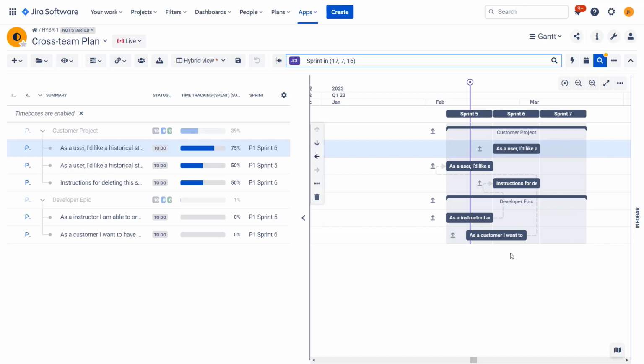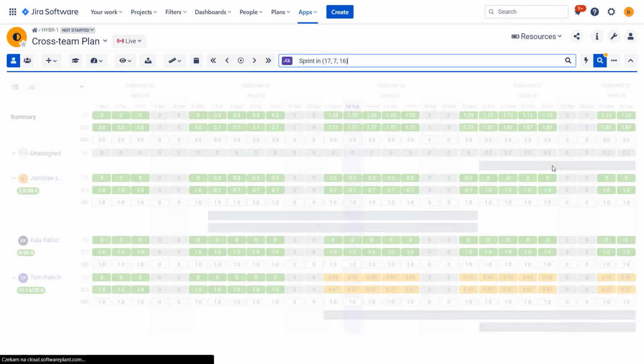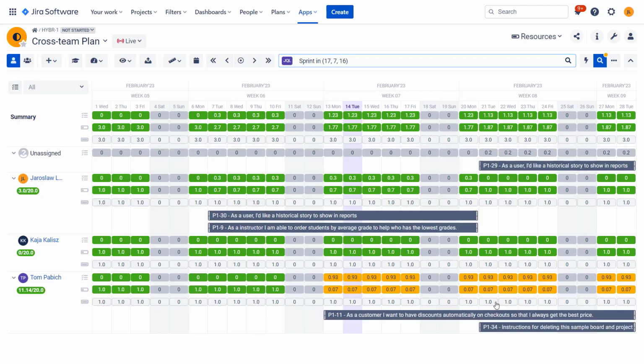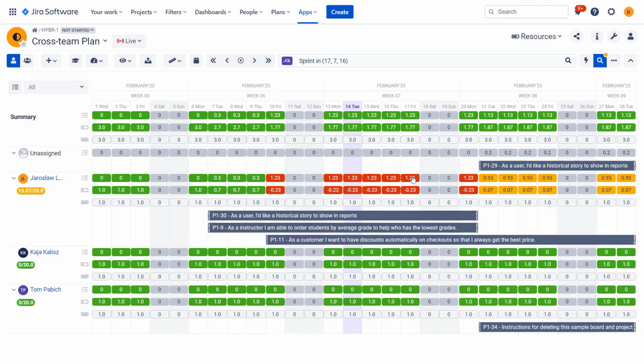But for the tasks in waterfall, this is what will be happening. So you will be going to resources, you'll be moving the tasks around, reassigning them by drag and dropping them, just to see where you can place them the best, who you can assign them to, so that we're not red anywhere. We know that there are no bottlenecks and we can work on this.